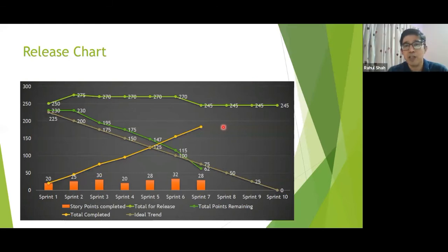One of the other benefits of this chart is you can create it in Excel, because we are not tracking this every day. We are tracking every sprint only. So yeah, this is a good chart. You can even add one line here which will show the average velocity. I think the next slide will cover that as well. I can read this chart, we will have some data, but it still doesn't answer the question of when this will be done. So we'll talk about that. But Neha and Hemant, I think this one is not there in Jira, not with this clarity.